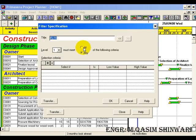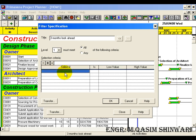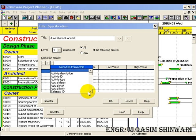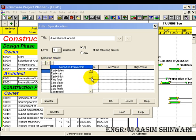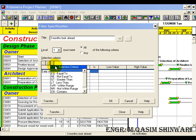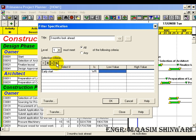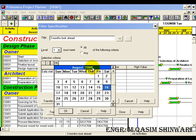Let its ID be 16, and the filter name should be 'Three Months Look Ahead'. It must meet all of the following criteria. Here we have only one criteria — select early start — and the condition is 'within range of'. The low value is today's date. Click on calendar so you can see today's date is automatically written. Click on check. Now for the high value, we are going to set the next three months — so one, two, three: next three months.